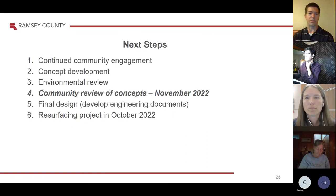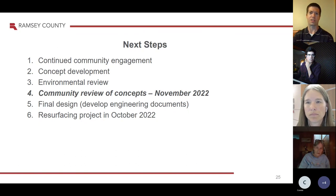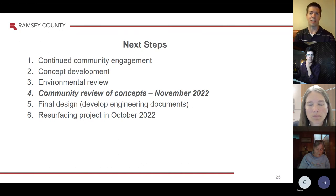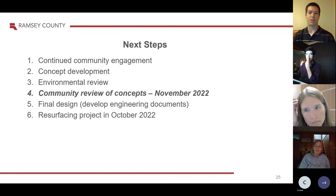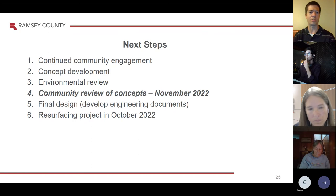What we've been talking about is the full reconstruction of Jackson Street between Arlington and Maryland. However, between Arlington and Larpender, it's still a pretty rough surface roadway but it is an asphalt surface. We didn't want to wait until 2026 to resurface that, so this year we're going to grind off the first inch or two and put a new asphalt surface down between Arlington and Larpender. There's some work out there now — sidewalk work at pedestrian ramps at each of the corners and some catch basin work. The resurfacing will probably be mid-October. Then we'll stripe in the bike lanes — right now it's a striped shoulder, so we'll put some bike symbols out there, designate the roadway a little more, and tighten up the lanes out there.